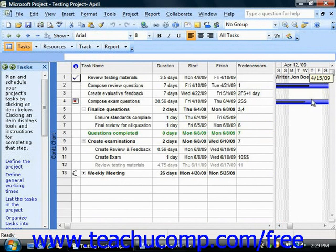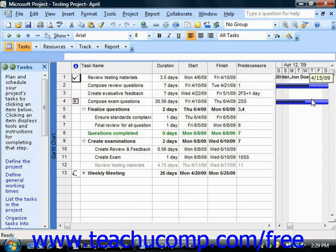When you view information from earned value analysis within your project file, you compare figures at a specified date and time against the project file figures saved into one of the baselines that you have created. In order to perform earned value analysis, you must have saved at least one baseline copy of the project file in order to show earned value analysis results.